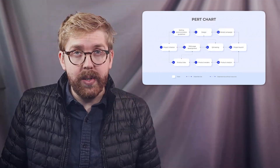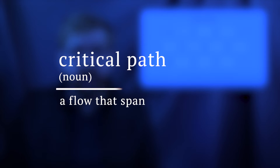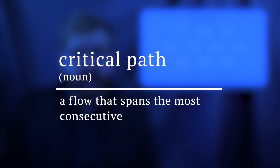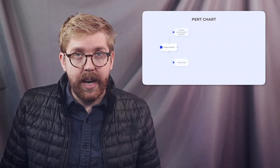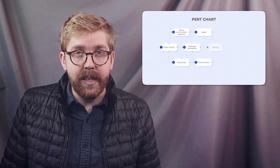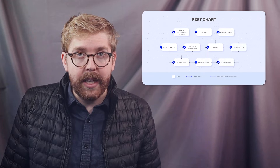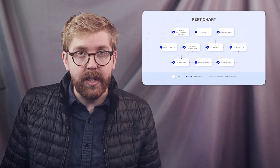PERT also includes Critical Path, which is a flow that spans the most consecutive dependent tasks. Because of that, it's critical to the project's success. Having all the tasks laid out in this way will help you estimate the duration of the critical path and the project as a whole.